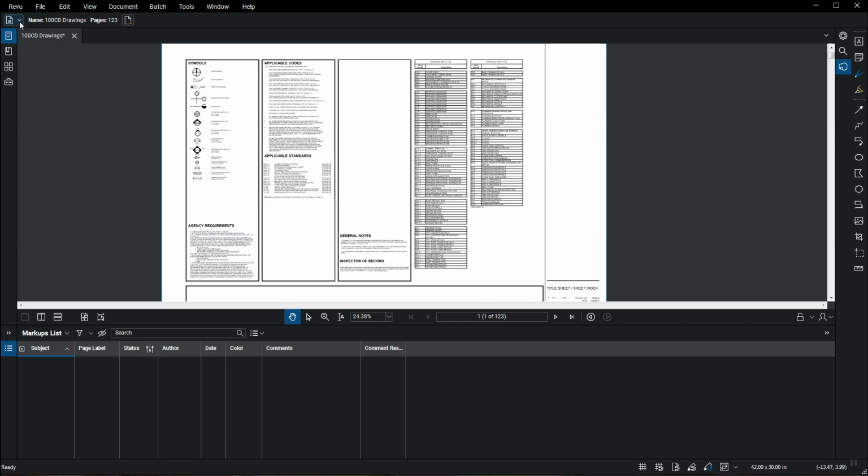Export documents to PDF format. File size cannot exceed 1 GB. To check file size, go to the file icon in the upper left corner of the interface and check file size at the bottom of the drop-down menu. If file size exceeds 1 GB, file must be broken into volumes.